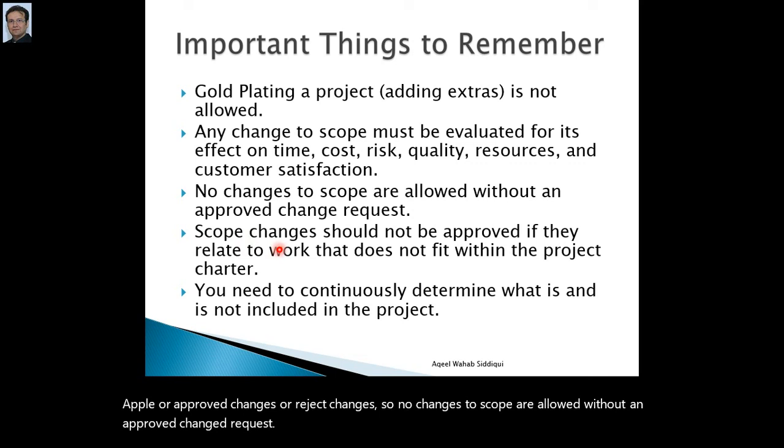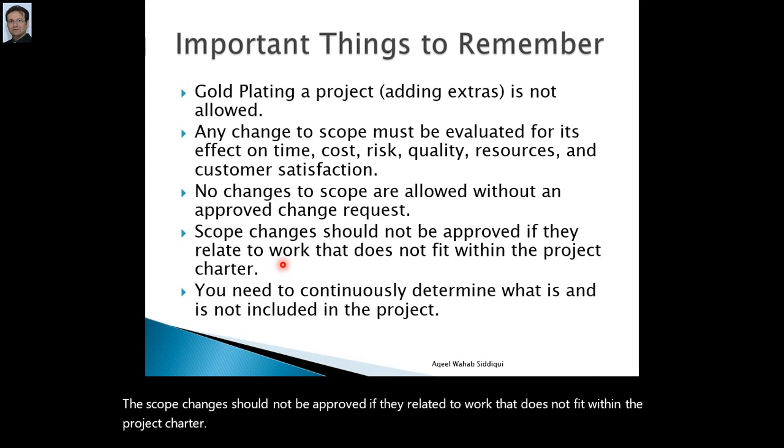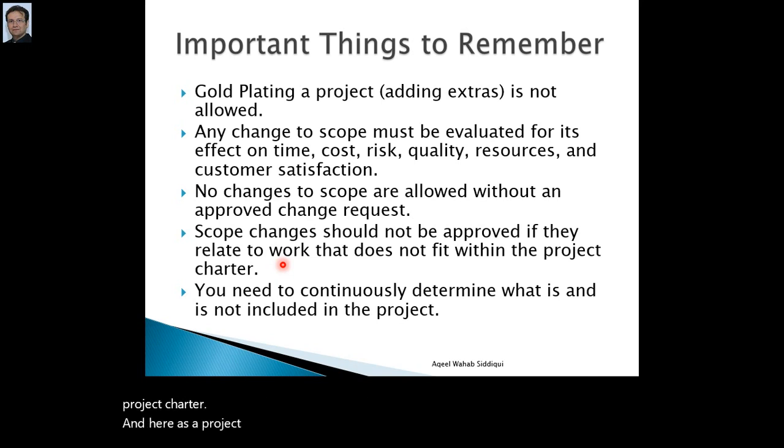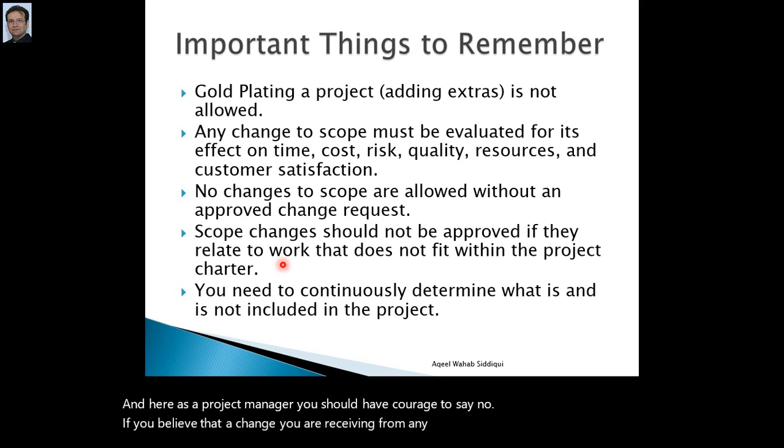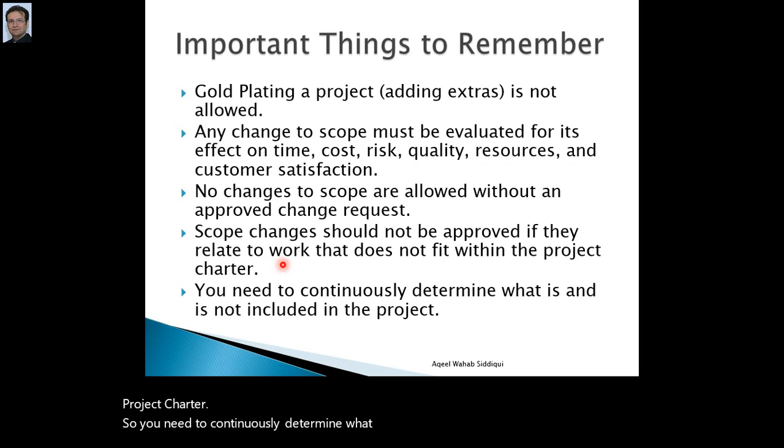Scope changes should not be approved if they relate to work that does not fit within the project charter. And here, as a project manager, you should have the courage to say no if you believe that a change you are receiving from any stakeholder does not fit in the project charter. So you need to continuously determine what is and is not included in the project.